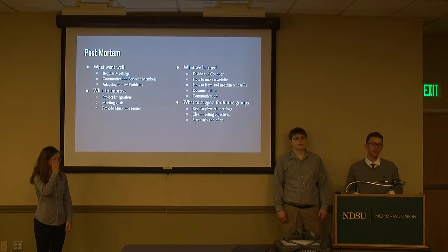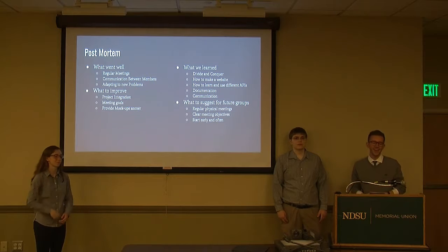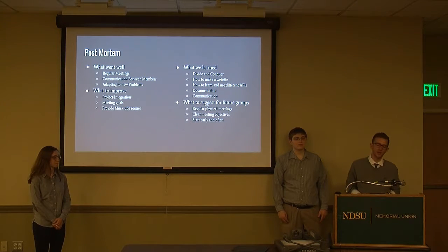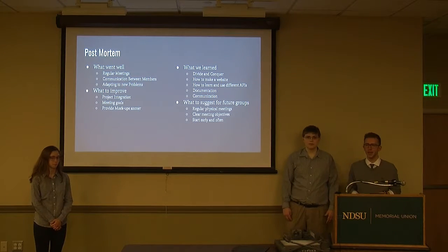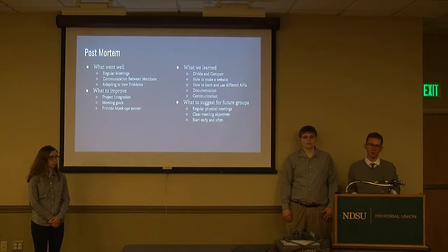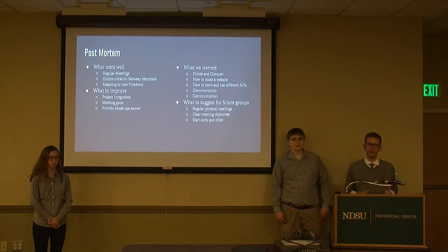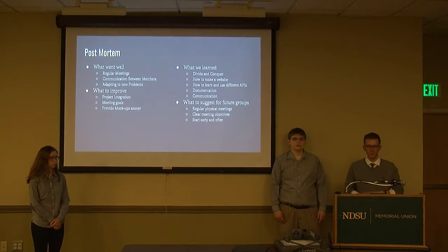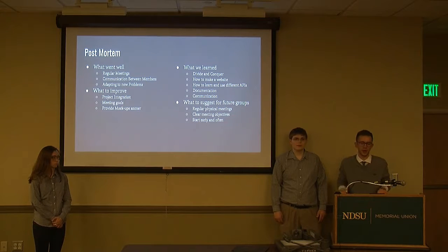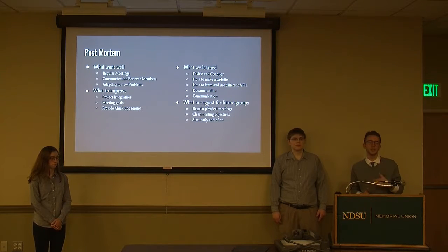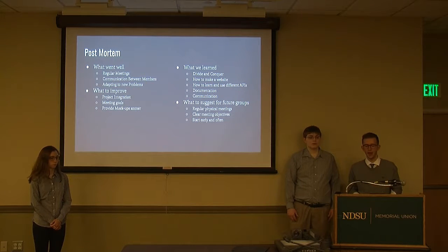I mean, we saw each other every 2 to 3 days, whether we liked it or not. We were able to keep in touch and understand what we were struggling with and what we weren't. One thing we learned towards the end that we wish we would have done more consistently was setting up 1, 2, or 3 small goals that absolutely needed to get done. Otherwise, we'd be behind. When we had a time crunch, it proved really useful to know that we had 4 to 5 hours if we really needed it, or if it took 2 hours, it took 2 hours. But we were always making consistent progress, at least towards the end with that strategy.